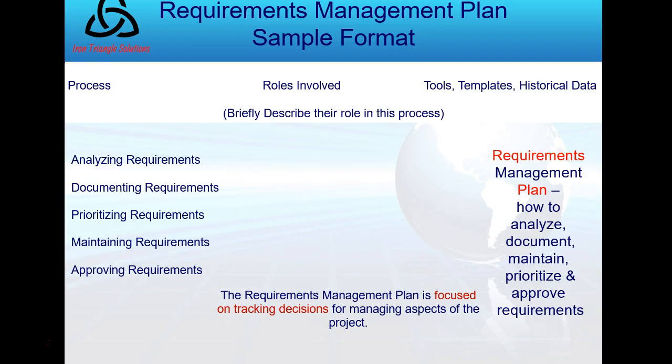There's going to come a time where I tell some stakeholders that's a great idea or a good requirement, but it's not really part of the charter or some other formal document or a government regulation. Hence, it won't be part of this project. So I'm going to track the decisions on the requirements and trace the ones that are applicable to completion.